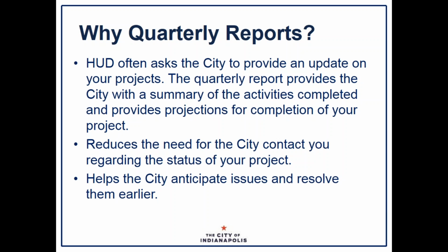You may be wondering why we require a quarterly reporting form. That's because HUD will often ask the city to provide an update on our projects. The quarterly report provides the city with a summary of the activities completed and provides projections for completion of the project. Also, the reports reduce the need for the city to contact you regarding the status of your project, so we're not having to reach out to you for little questions.